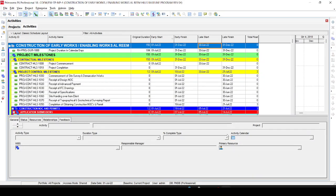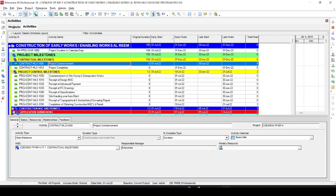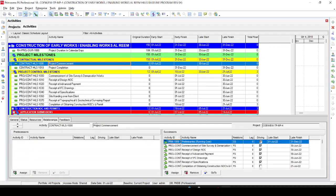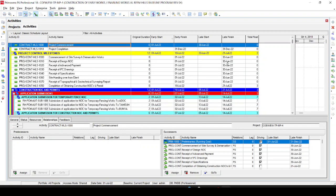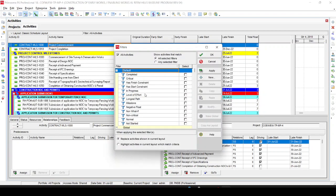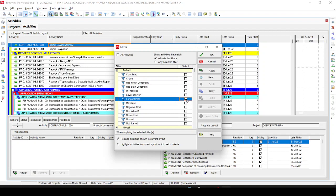Back in Primavera, we can see the early start is 1st July and the late start is 30th June. This means these two dates are not coinciding because the project commencement date is a milestone and all the activities after it have Finish-to-Start relationships. To solve this issue, we need to go to the critical path or longest path and fix the issue. Let's open the longest path.